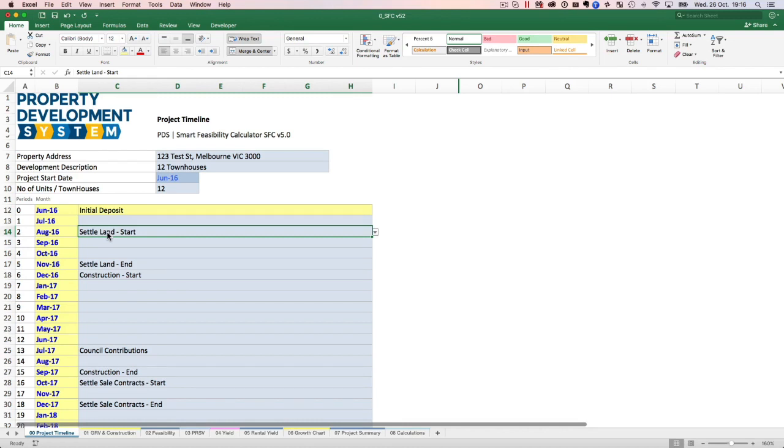And then we had to wait a little bit more because the site had an NOD, which is a notice of decision from the council. But even after the council issues their notice of decision, there is a 21-day cooling off period. Not due diligence, a cooling off period.